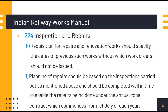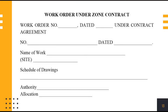The Indian Railway Works Manual has two references in connection with zonal works contracts. In Para 224, under the heading Inspection and Repairs, it says a requisition for repairs and renovation works should specify the dates of previous such works, without which work orders should not be issued. Planning of repairs should be based on the inspections carried out and should be completed well in time to enable the repairs being done under the annual zonal contract, which commences from 1st July of each year.